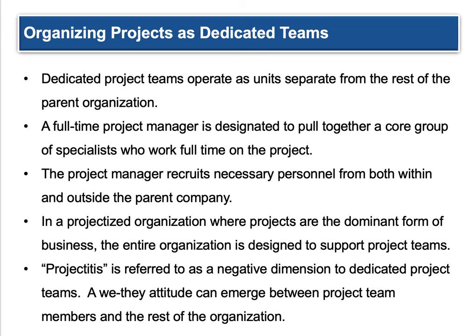"Projectitis" refers to a negative dimension of dedicated project teams — a "we vs. they" or "us versus them" attitude that can emerge between project team members and the rest of the organization, so it can get quite competitive. Some people have more routine jobs and may be jealous of those with more creative roles. There can also be a blame game, where people say the project only got approved because of someone's connections. There's a lot of professional jealousy here — pluses and minuses.